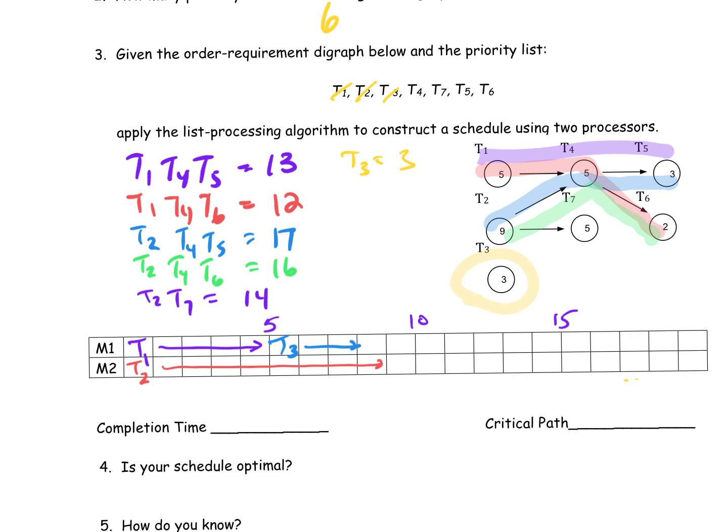Now I look at Task 4. Task 4 is being fed by Task 1 and Task 2 — both have to be completed before I can schedule Task 4, so it goes after Task 2. I want to try to schedule it on Machine 1. After Task 3, we've got idle time, but then after that I can schedule Task 4. Its completion time is 5, so I need 4 more boxes — takes me out to 14. Take it off your list.